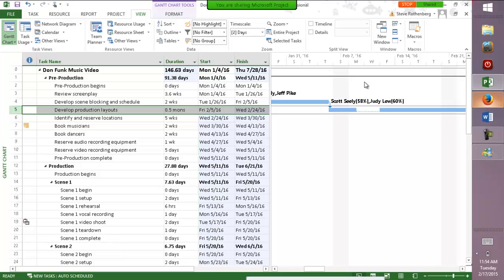And to do that, Microsoft Project may have to split a task to free up somebody, to reduce their over allocation. In other words, it might say, you're over allocated for these 2 weeks, but if we just move that second task out to start a week later, or stop working on it now and start it again in 2 weeks, then you'll be leveled, which is the term used to say that everybody has just the amount of work that their calendar says they're supposed to.